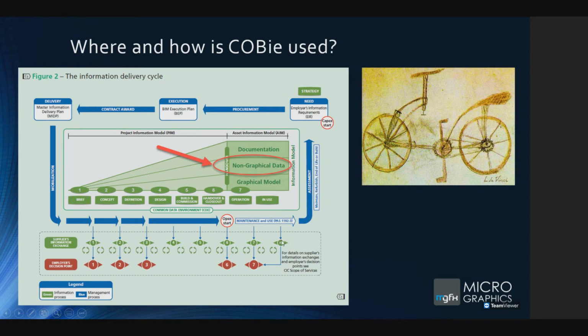Now, critically, in this diagram, what you can see between definition and design, this is where the client takes a backseat after this point. Then the process of design, build and commission, and handover and closeout is completed, and then there's another data drop. And that data drop shows you OpEx start. The operational expenditure within the building's life cycle starts. This is where the COBie drop starts.